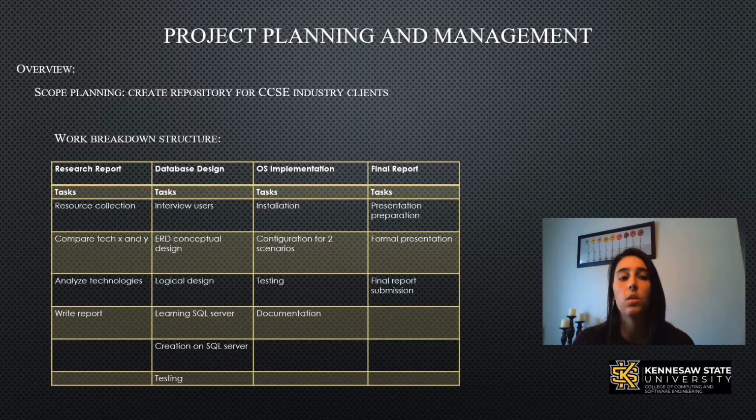The OS implementation category was broken down into 4 tasks: installation, configuration for 2 scenarios, testing, and documentation. And finally, the final report was broken down into 3 tasks: presentation preparation, formal presentation, and final report submission.